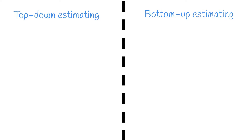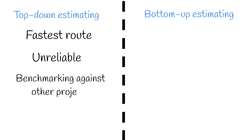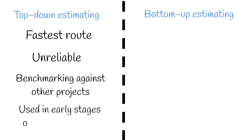Project estimating can be split into two camps: top-down estimating and bottom-up estimating. Top-down estimating is the fastest route for cost estimation; however, it is also considered the most unreliable. It utilises benchmarking against other projects to form a cost estimate. A top-down approach is often used in the very early stages of a project, and provides a tool for early decision-making.